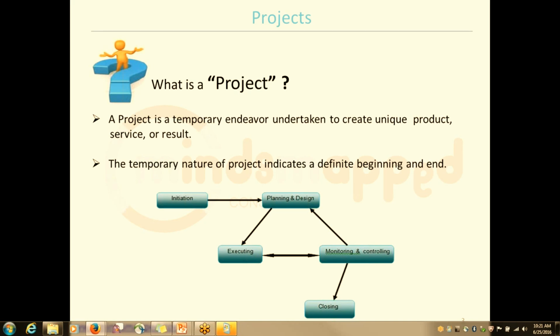Along with the business case, we would be giving several other deliverables, like a feasibility study. Feasibility study means: what's the problem we are having, how technically it is possible, how the architecture would be, how many resources need to be there. Because if we are adding resources, the total profit we would be getting, minus the total expenditure on the resources, will get deducted from there, right? So all feasibility studies also we have to do on initiation.